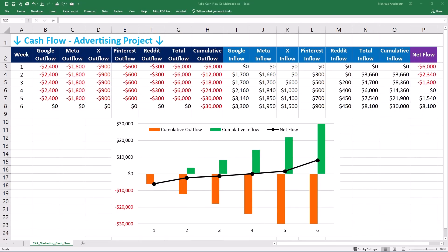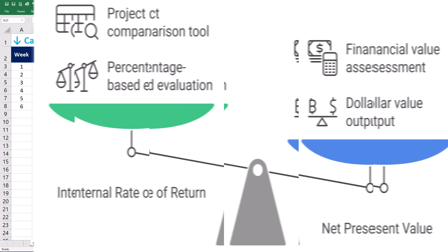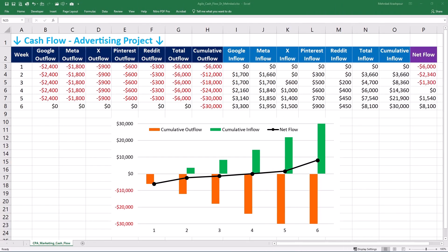The internal rate of return or IRR is the discount rate that makes the NPV of a project equal to zero. Unlike NPV which gives you a dollar value, IRR gives you a percentage. If the IRR is higher than the company's cost of capital, the project is generally considered acceptable. IRR is especially useful for comparing projects with different investment sizes and timelines. To recap: cash flow focuses on timing and amount of money moving in and out; NPV calculates the present value of future cash flows; and IRR determines the project's rate of return as a relative measure of profitability.